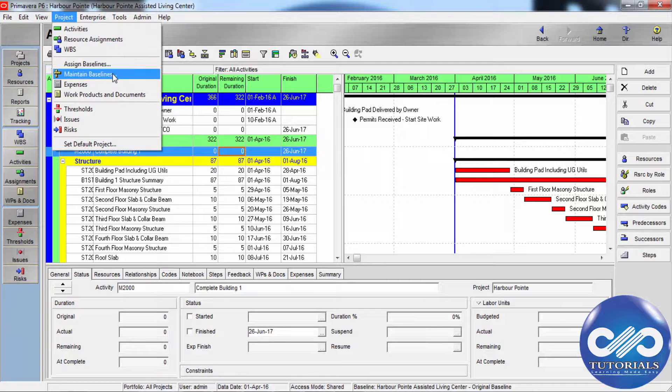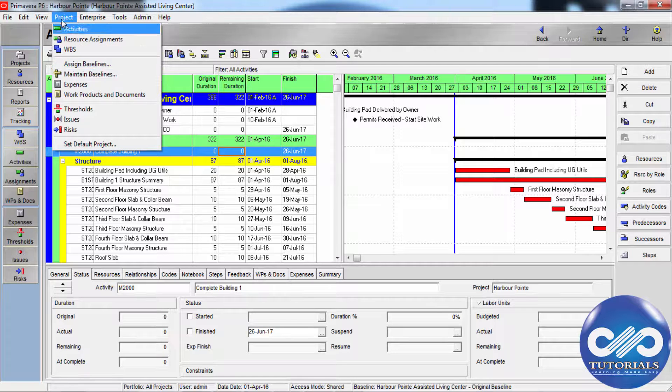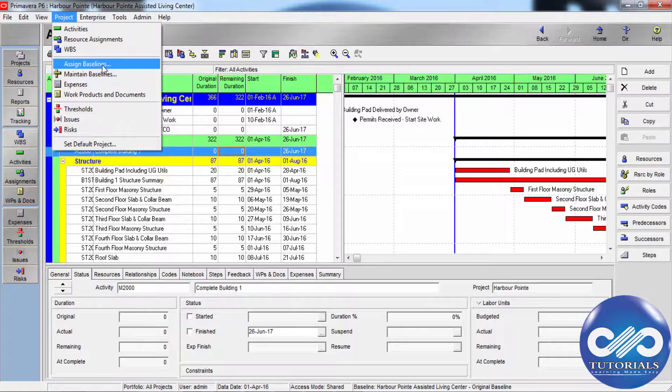First, go to this menu bar, choose projects and click on assign baselines.